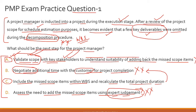The correct answer is option C: include the missed scope elements within the WBS and recalculate the total project duration. Once you have recalculated it, you might find you are in a comfortable position — the delay can be managed with the risk buffer already in the schedule. Or it may become clear you need to request an extension. Either way, you'll have the rationale and assessment to support your case. It will also be a lesson learned for avoiding missed scope elements in the future. Going by the logic discussed for all four options, option C is the most reasonable and rational approach.